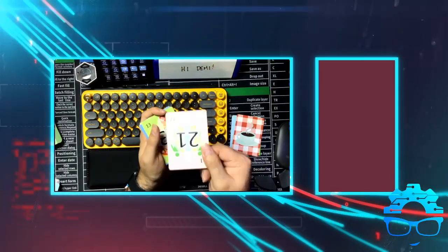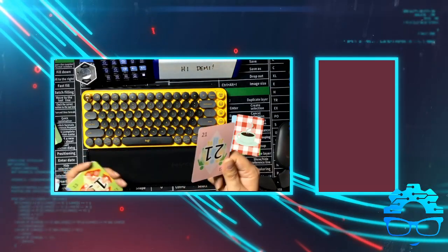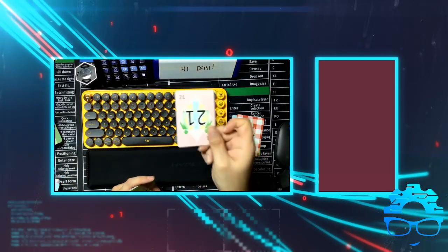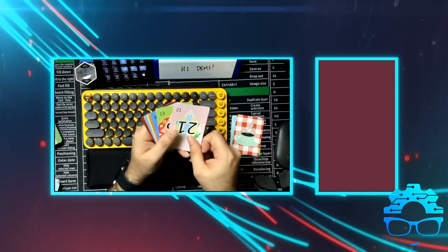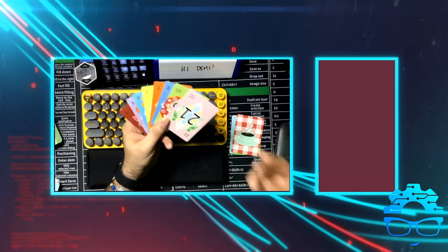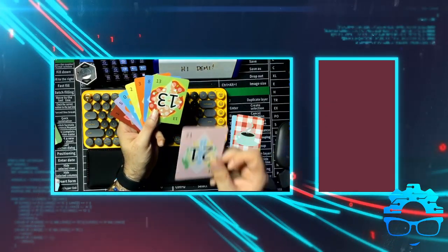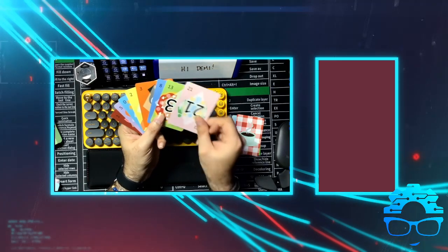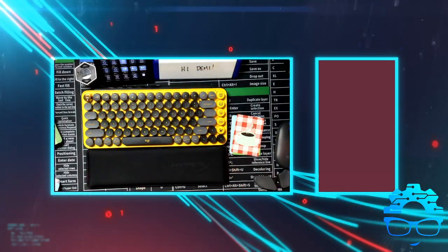For me, there are no 21s. That's just a rule I have, and so far it seems to work out successfully. For me, there are no 21s in my projects. 21 just means I didn't do a good enough job during my proposal to give you manageable tasks. So that's another thing we need to talk about, manageable tasks. We'll get to that in a second when we review Planner.